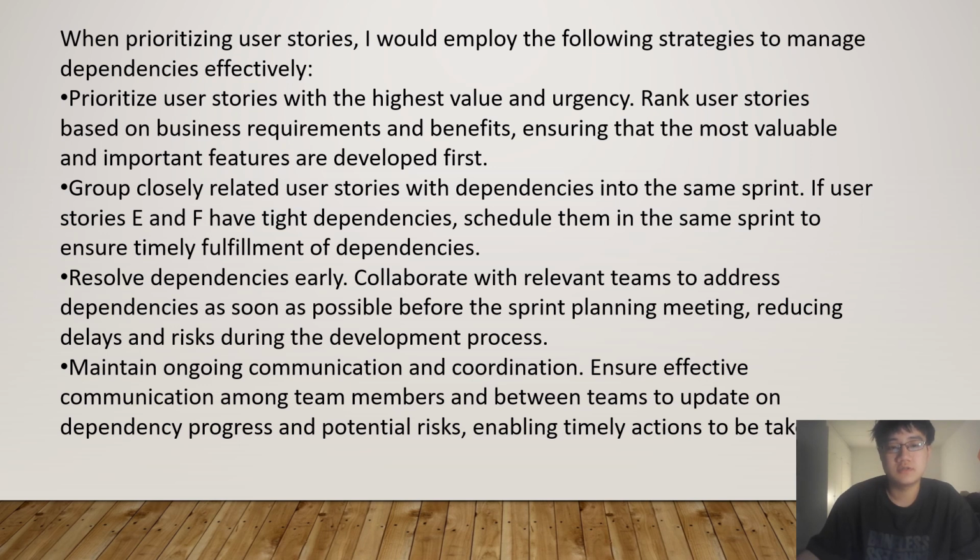The next question is task 3 and 6. When planning user stories, employ the following methods to measure the dependencies and influence. Prioritize user stories with the highest value, and rank each user story based on business requirements and benefits, ensuring the most important and valuable ones are developed first. Group closely related user stories with dependencies into the same sprint.